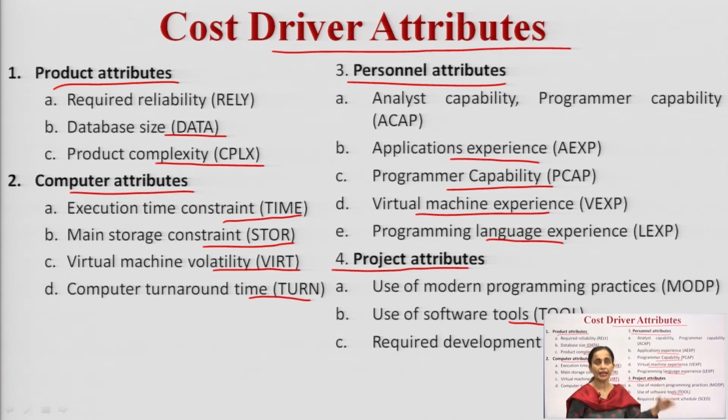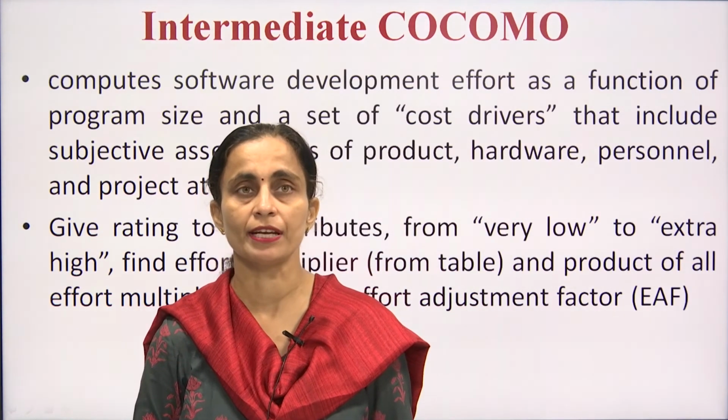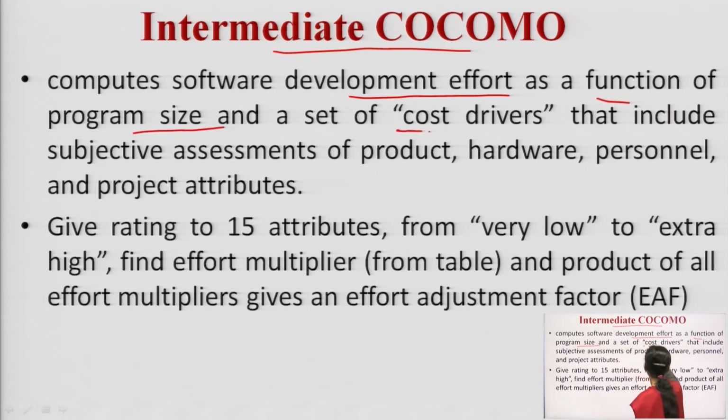So, these parameters will now be taken into account in the estimation of the cost, that is, in the COCOMO model, and then I will be re-evaluating my effort, my development time and other parameters. Next is my second type, the intermediate COCOMO model. It computes the software development effort as a function of program size and a set of cost drivers.